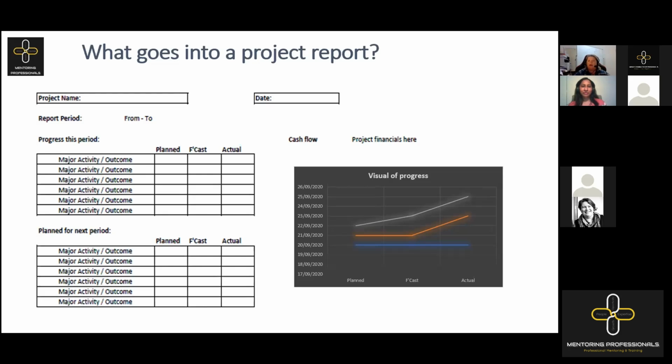Some of the things that I've actually seen in the past, again, from seasoned project managers, they've put a decision into what they call their steerco pack, and then they've come to me and said, my steerco didn't make a decision. And when I've looked at it, I said, well, I can't see where you're asking them to make a decision. And why on earth is it in the steerco pack in the first place? It shouldn't be there. The decisions that have been made can in fact be in a steerco pack, but not actually asking for a decision itself.